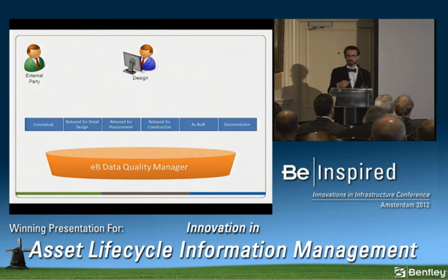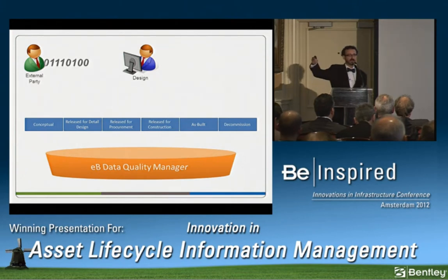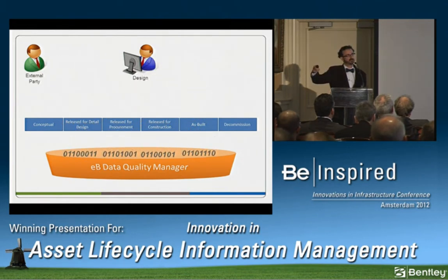Because Southern Company has a robust engineering construction services group, basically an EPC, we employ our design group to either contractually require, and that's the best case scenario, contractually require data to come from an external partner, or if that is not producible by that external partner, our design group is actually responsible for producing it for the facility. And all of that data flows through the EB Data Quality Manager as if it were domestic design.